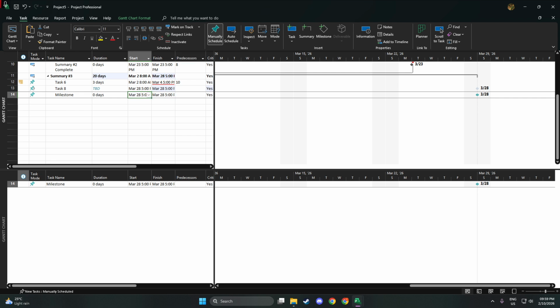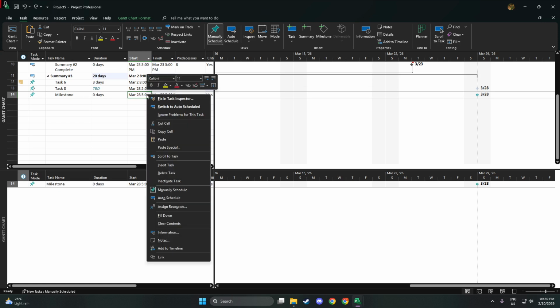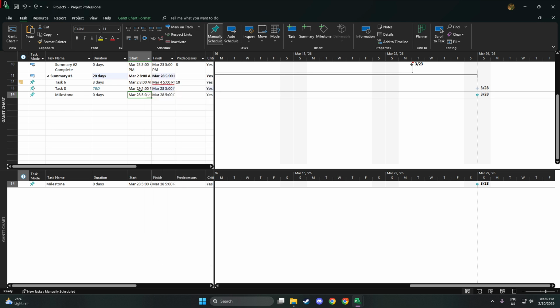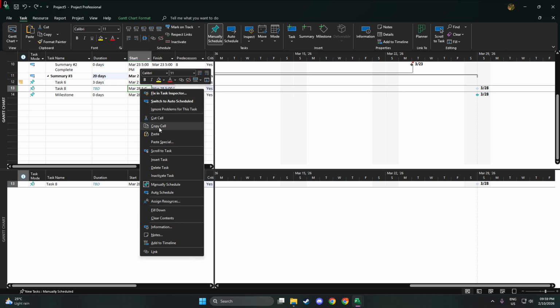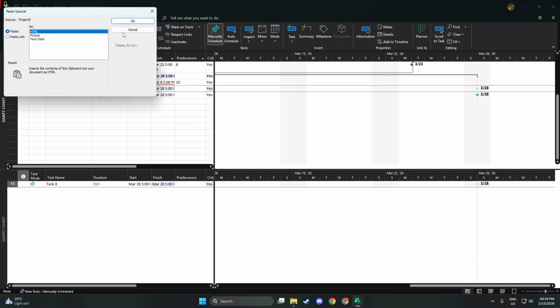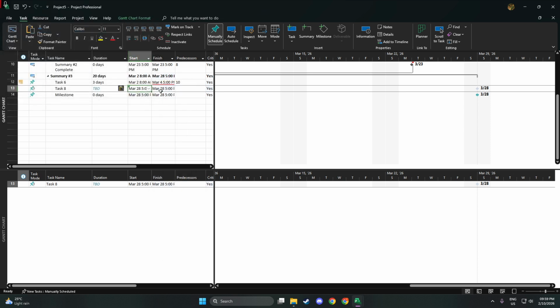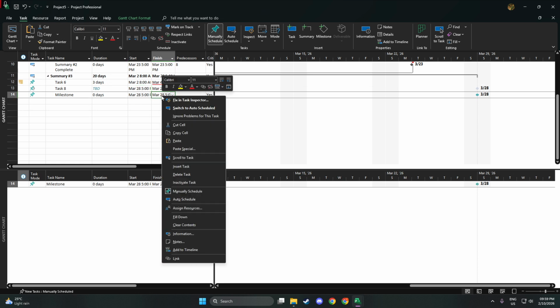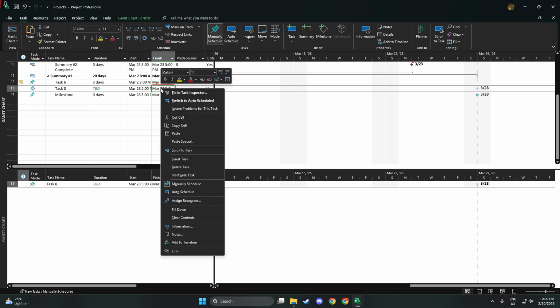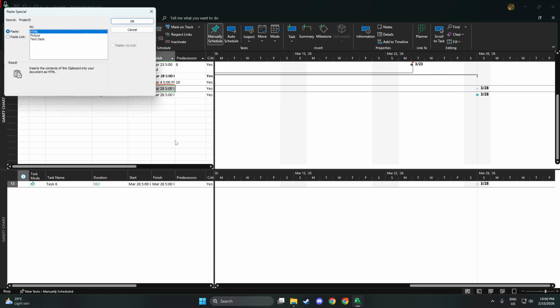A few tips as you work. Milestones should have 0 duration, so they don't distort the timeline. Use Paste Link specifically. A regular paste won't keep things synchronized. After linking, let the dates drive the Hammock. Avoid manually changing its start or finish. If you adjust the timing of the phase, move the milestones, not the Hammock. And give the Hammock a clear name so your team immediately understands what continuous effort it represents.